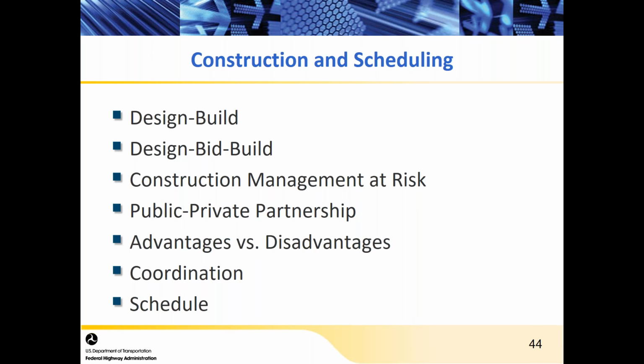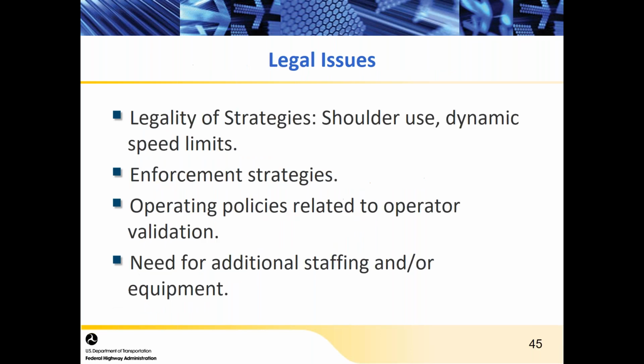online, that everything's coordinated, so you don't have equipment that's sitting in a warehouse for months and months on end because it's ordered too soon, and then hopefully make sure that you have plans in place for redundancy if you have systems that fail or you have equipment that needs to be replaced. How do you deal with all of that? And then the schedule as well is very important so that you don't fall behind.